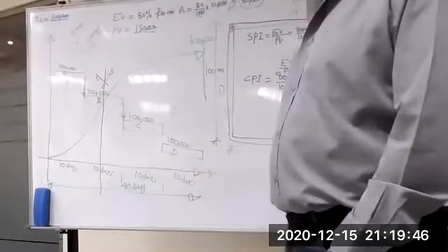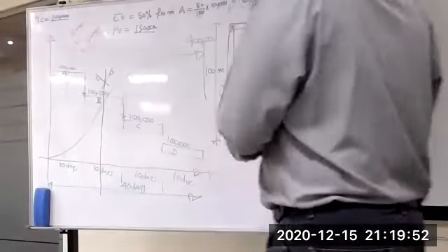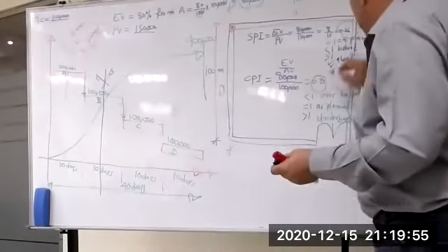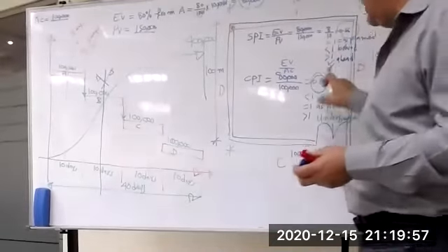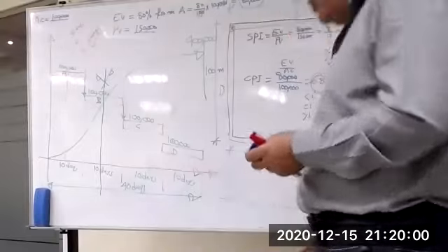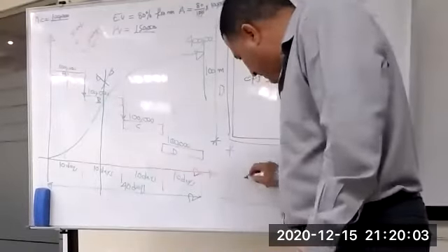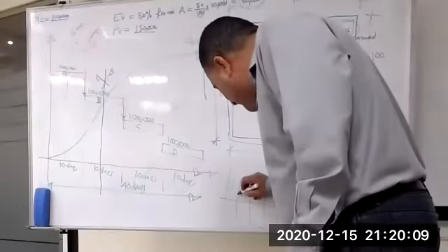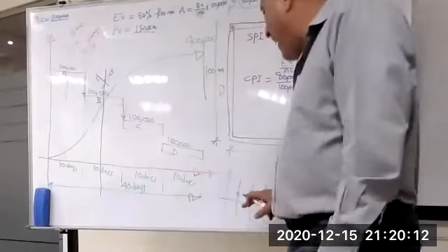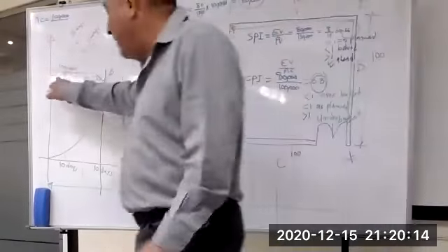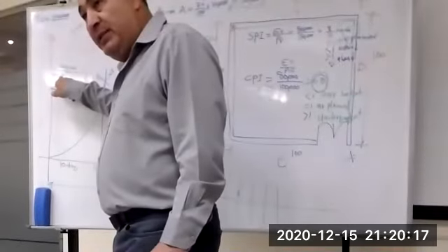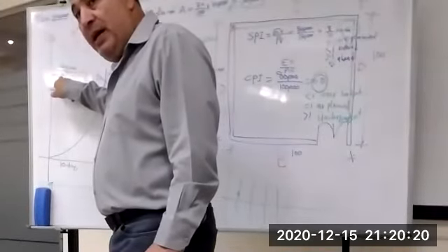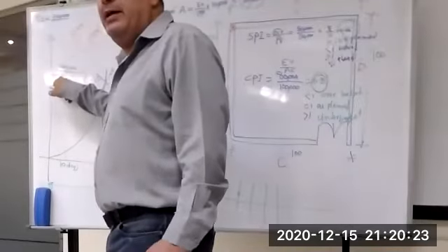Ask yourself, what is the root cause I reached this level? This level? Yes, this level. Trend? Yes. Assume now, for everyone, every 5 days. You have to put both. Every 5 days. Because if you come here, in the first 5 days you found yourself behind schedule and over budget. What do you have to do? You are going to take action early. So what is the root cause first?